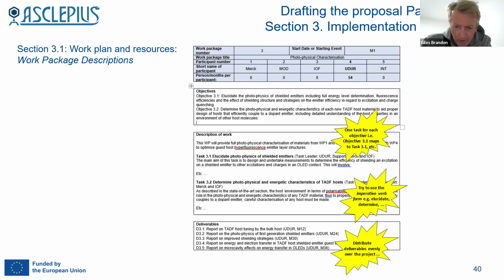And the other thing to note with these work package descriptions is you need to indicate deliverables. And the key point with these deliverables is make sure that they are reasonably well spread across the duration of the work package. It's too easy to just have all the deliverables stacked up at the end of the work package. This is not good. You'll get criticized for it.